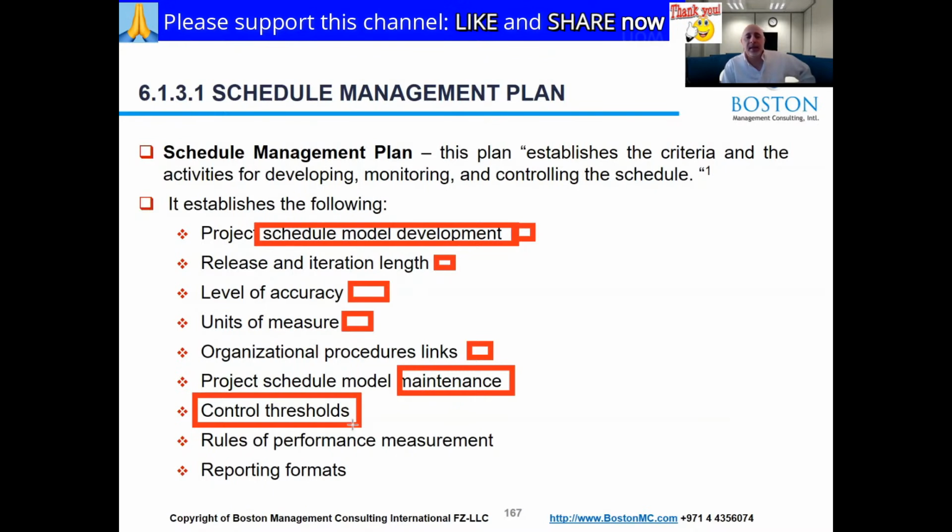The reason is I may have a dependent activity that a contractor is doing that's waiting for you to finish. So if you're late, the contractor is going to show up as planned if we already agreed with them and you haven't finished. So I really want to know. But this usually happens on a smaller project when I'm talking about days. On a larger project, let's say oil and gas installation, maybe you can talk about a month.